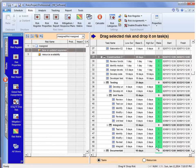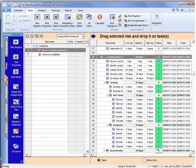So this is a quick way to take risks that you've got in your risk register. Go to the project schedule, go to this view, or you can do it from the schedule or the risk register, and assign that risk.